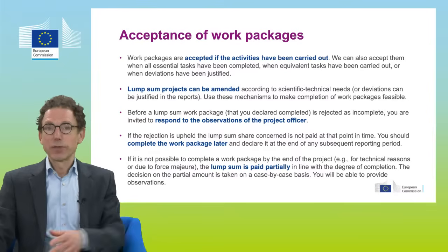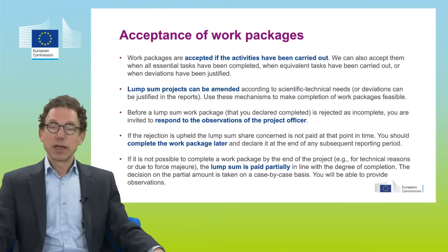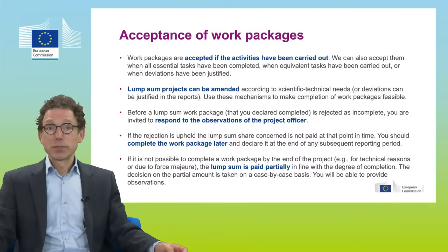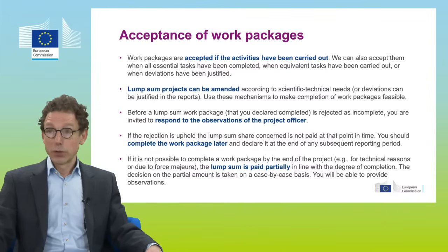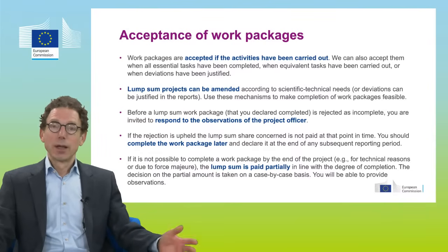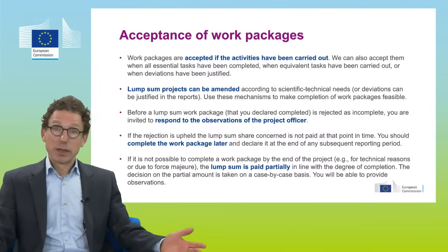until the very end of the project. Only then do we take a final decision on accepting it in full, partially or not. So at intermediate stage, we will always only accept work packages in full or not at all, in which case, if you like, we postpone the decision on this work package until you have tried to improve it. And this is of course possible until the project comes to an end.